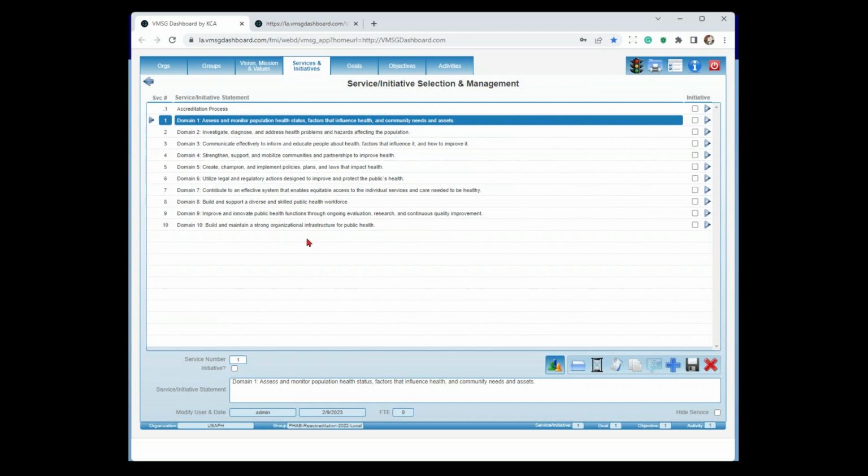Secondly, you're going to say, okay, we're planning on submitting on December 31st of 2025, whatever that happens to be, when you're ready to submit for reaccreditation. So we'll push the end date of all the activities down there. You determine the start date. It can be today or it can be 3 years ago, whatever you want it to be.